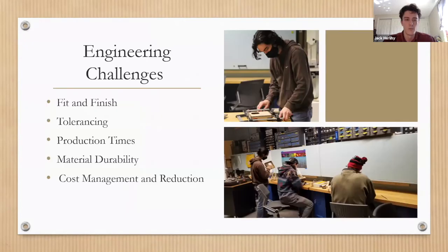While making the headphone stand, we ran into a few problems. I think our biggest problem was time. We definitely did not do a great job of calculating how long finishes would take to dry. And we actually almost pretty much forgot to account for how long the glue would take to dry. So that accounted for us pretty much working until the very last minute on this project.